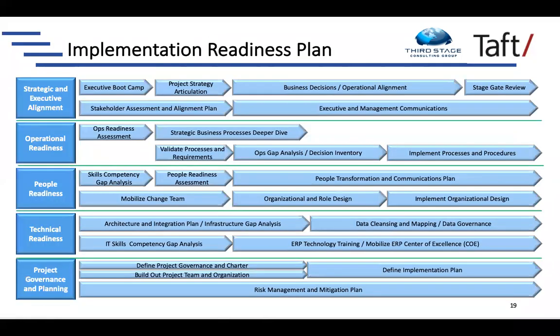And then once you do select D365, this is a slide we reviewed yesterday when we were talking about implementation readiness. This middle work stream around people is all the stuff that you would typically need to be doing or should be doing after you've picked D365, but before you start fully moving ahead at full speed with designing and building the software. So the short answer is it should happen as soon as possible, and chances are, no matter when you started, it's not early enough.